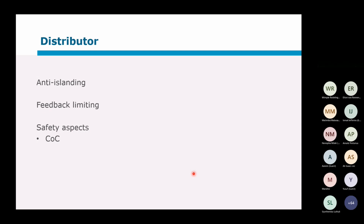First, the pre-commissioning. It's the responsibility of the party who did the construction or contracted the construction. So the distributor's assets that he physically had constructed or contracted become his responsibility, to make sure that all the relevant pre-commissioning tests, integration tests and commissioning tests are done on that equipment. For the generator, all of their plant that's going to remain their property, it's solely their responsibility to go through all the tests. There, it's also required to add the grid code compliance, so that they are ready to do the grid code compliance after commissioning has finished.